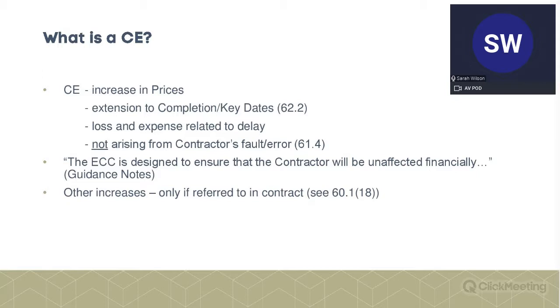That could be really damaging if the variation was a big amount of work, because the contractor could find it's doing the work at a loss because it put loss-making rates in the contract. That's not supposed to be the case at all on NEC.